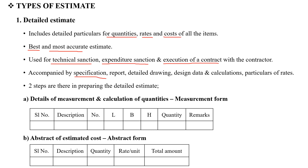What is the detailed estimate? It requires Specifications, a Report, Drawing and Design, Calculations, and Rates.